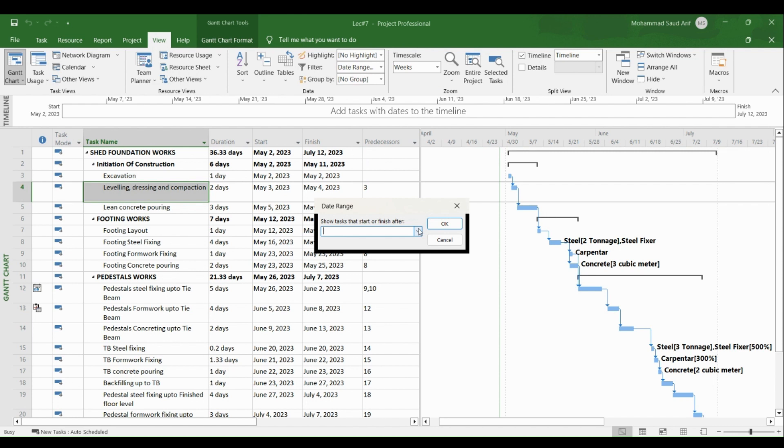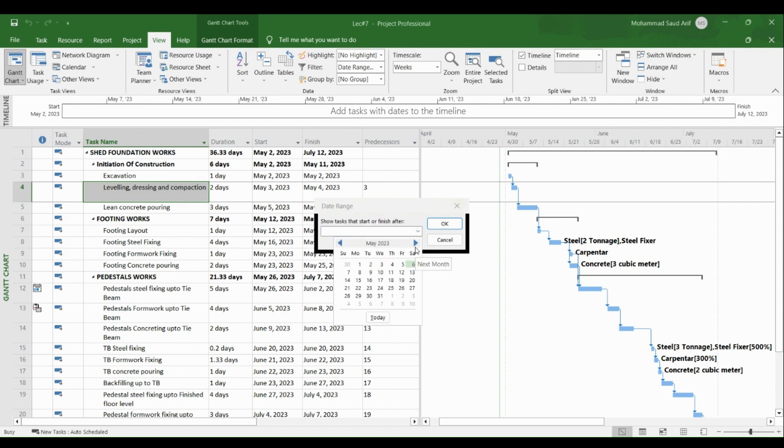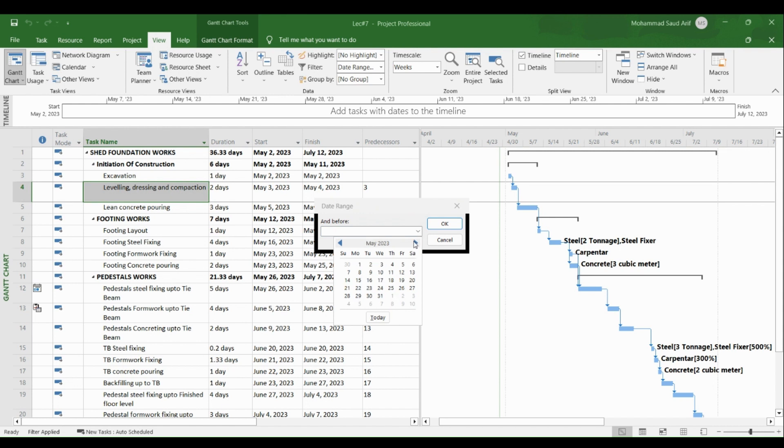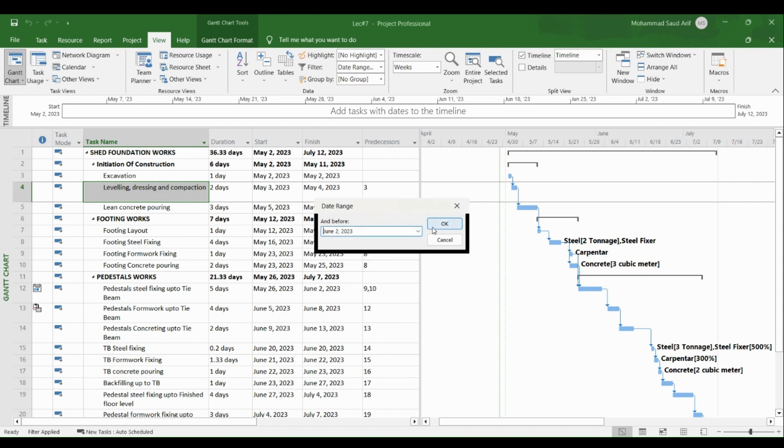we'll create a four week look ahead, so I'll select fifth May and the end date is second of June. This will be a four week look ahead and I click OK. So what will it do, it will